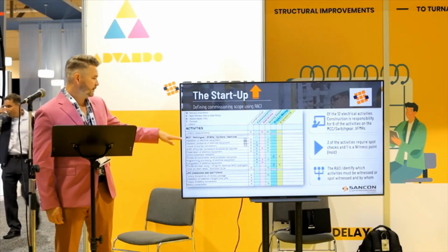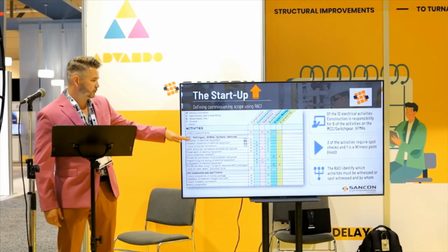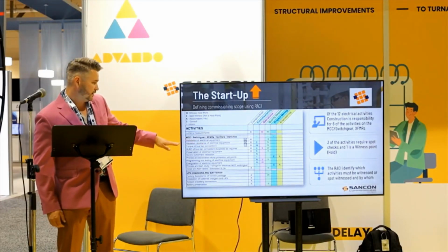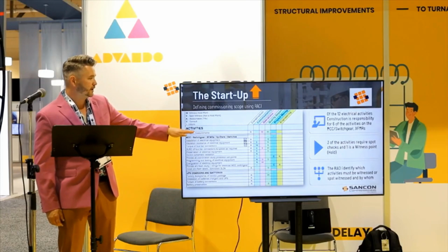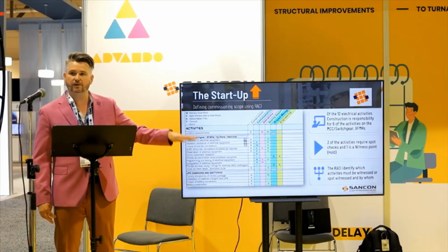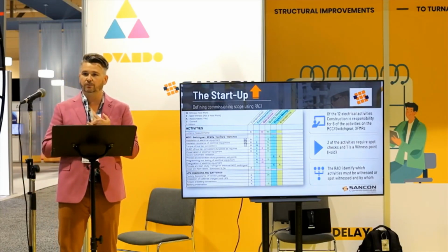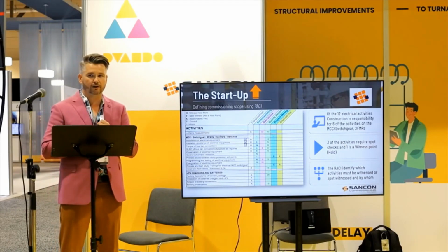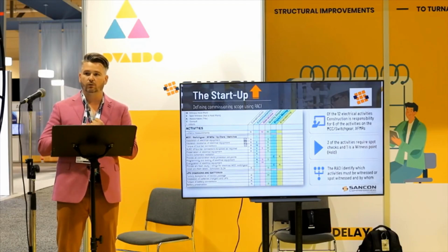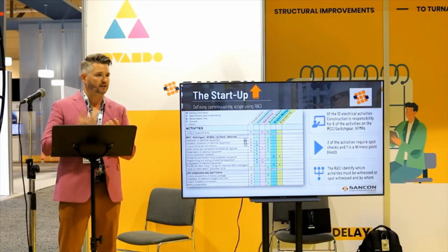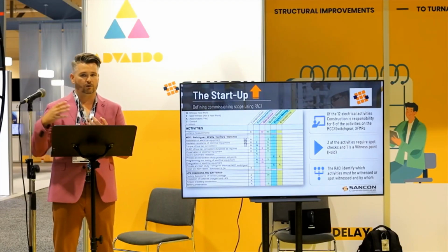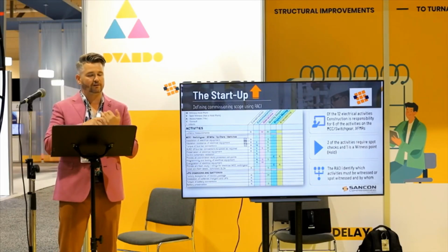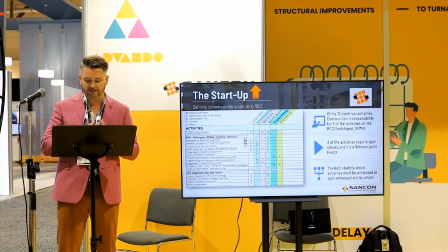Who's going to be responsible for the electrical equipment? Construction is responsible for the installation. The installation resistance test is going to be completed by construction and spot witnessed by the commissioning team. Now we're killing two birds with one stone. Construction's already in there. We're not going to duplicate the task by commissioning coming in and redoing the installation test. We're going to witness this. We're not taking pieces of equipment apart twice. We're not getting hands in the way. We're being more effective and efficient, and we're not duplicating tasks.